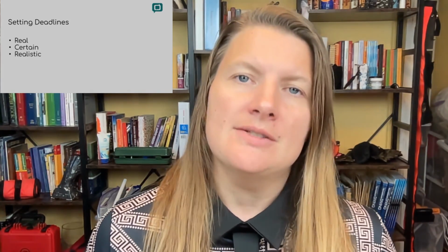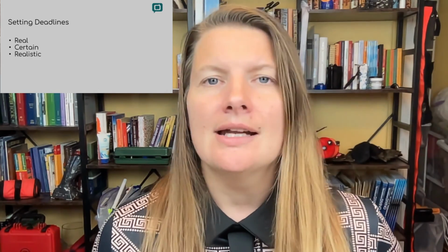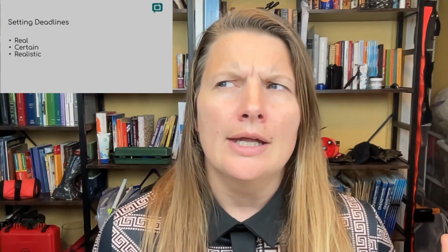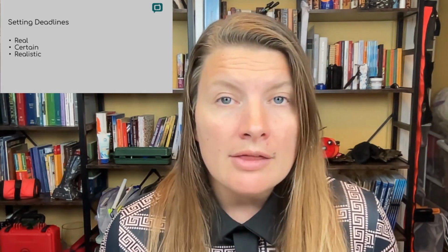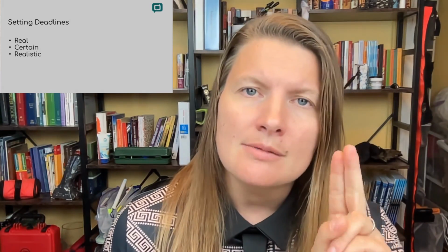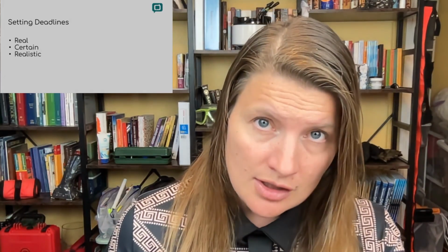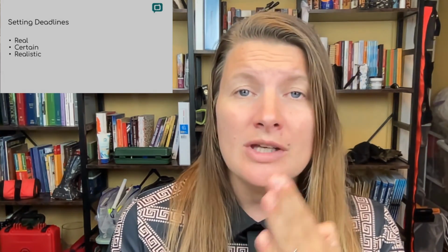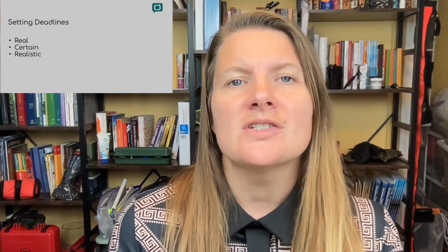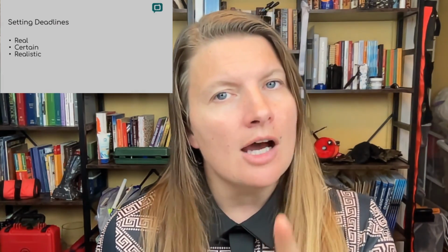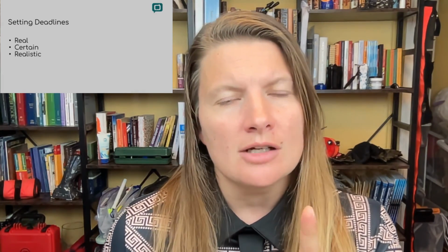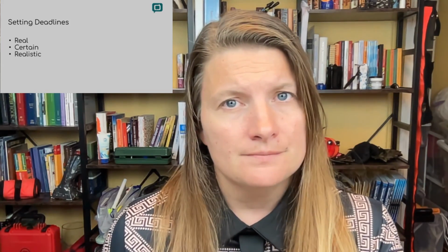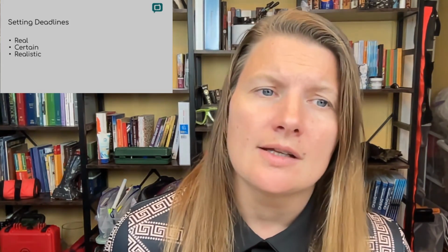Real deadlines have to be certain. What I mean by that is if you saw in the task matrix, none of the dates are just a month and a year or a month. No, there is a date. There is a date certain where all of these things have to be done. You want an actual date. And when we say that day, we mean close of business that day. And we will talk about this, but I don't think you're going to be shocked to hear it doesn't mean midnight that day. It does not. It means close of business on that day.